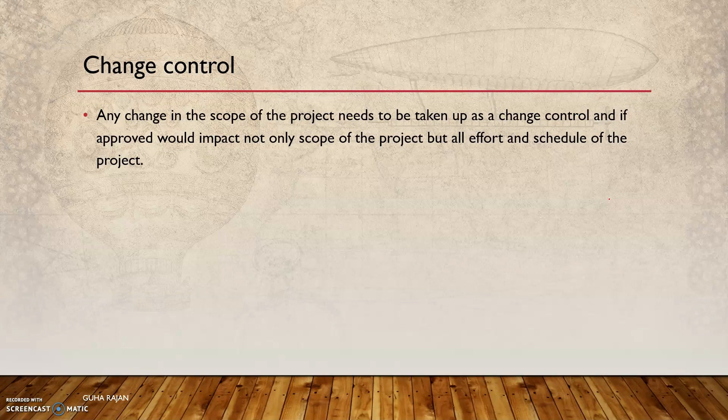It needs to go through the change control process, which must be defined before the project starts. The change control board will be there in the project, so any changes to the scope need to go through this process. In summary, the baseline is an important tool to compare actuals versus the plan as you execute the project.